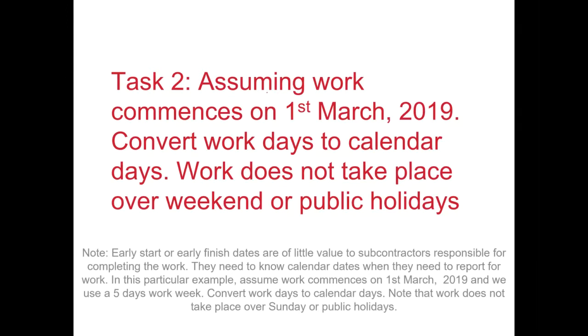So these scenarios begin with assuming the work commences on 1st of March 2019. You have to convert the work days to calendar days. Work does not take place over weekends or public holidays. So this is given as the project start date. So if you could convert this into a bar chart using 1st of March 2019 as the start date.